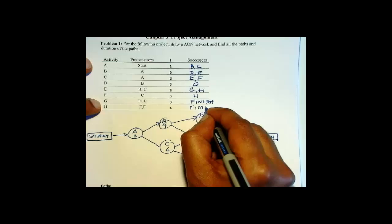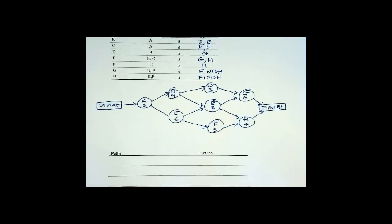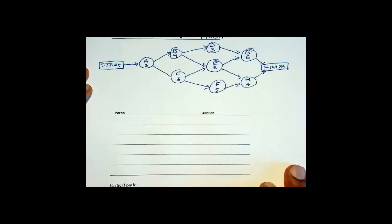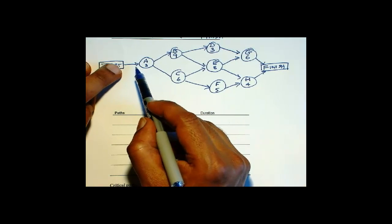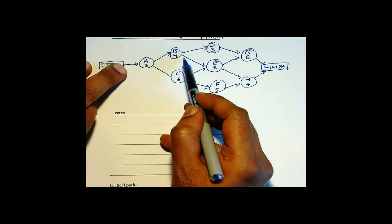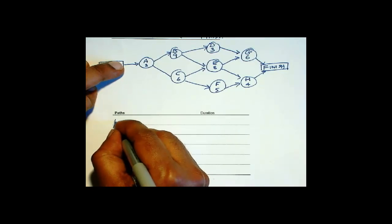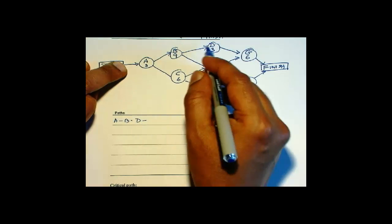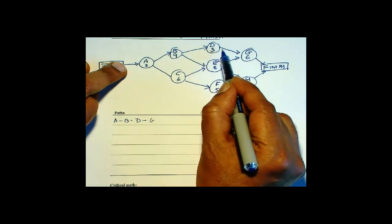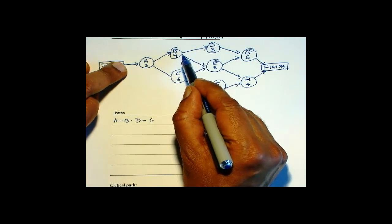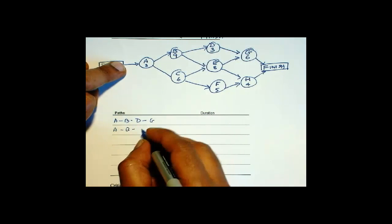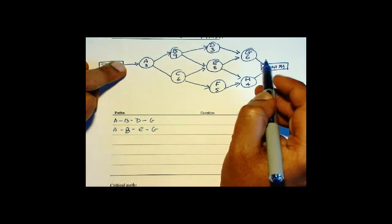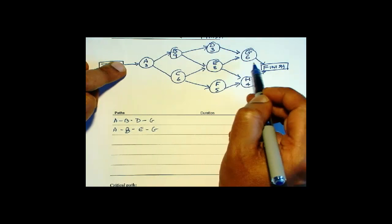Next we have to set up the paths. We need to make sure that we count all the paths and don't miss anything. One way of doing that is to make sure that whenever there is a choice, you take the uppermost arrow. So we have A, B — then we have a choice, so take the upper arrow — D, then G. Then trace back to the last point at which you made a choice and make the other choice. So: A, B, E, G. Now we made a choice at E, so trace back only to E and make the other choice: H.